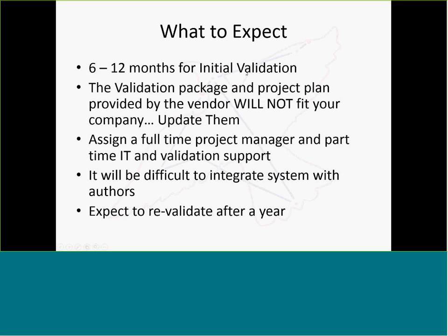Now, what to expect with your validation? I have never had a validation that didn't take 6 to 12 months from the time of purchase to when it was released for full use. 6 months is if you've brought in someone who has experience with the system, is not an employee of the vendor. It needs to be a third party.